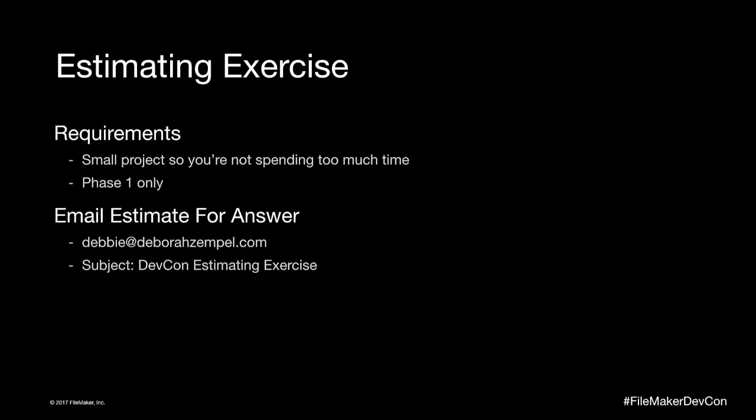So then once the client says, okay, that's within budget, then I tell them up front that the first thing we're going to do is a storyboard. Here's why the storyboard is useful to you and useful to me, and also that it's going to allow me to do a detailed estimate, so that I don't have to come to you and say, well, it's going to be between X and X. I can come to you and say, it's going to be more like this.